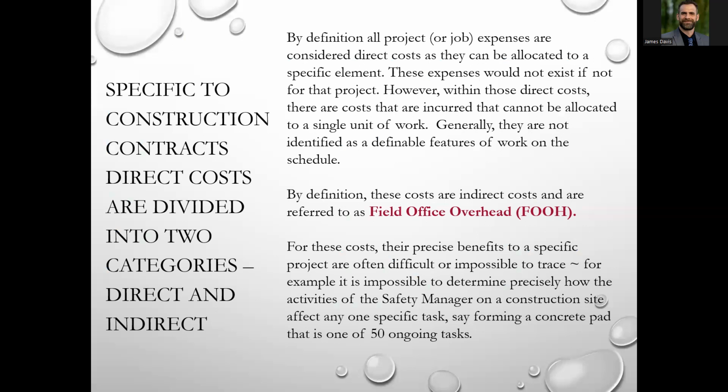And so there's another way, again, coming up with a percentage, applying a very similar process to the indirects or the G&A to those direct costs. And again, we can collect those costs. They're still direct. I have to have them as directs. They're not ever reported as G&A, but I can collect those costs in the same manner and come up with a percentage and apply those costs within my direct costs.